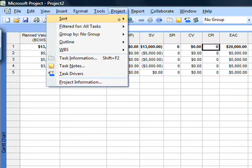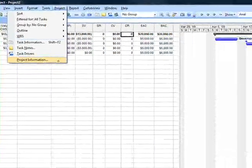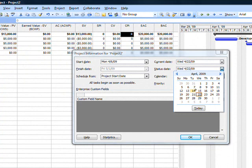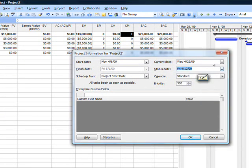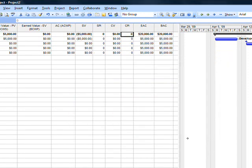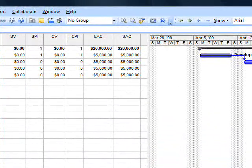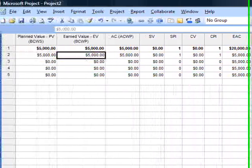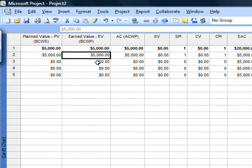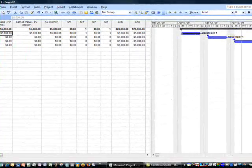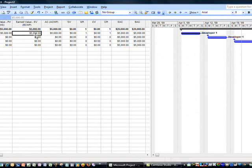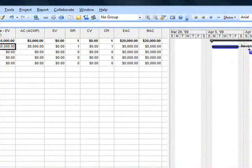Now let's observe the effect of status date. Go to Project > Information and set the status date. Let's say we've worked for an entire week — the project started on the 6th, this is Friday, and this is an inclusive date, so this would be at the end of Friday. If I've done no work, there's no earned value. But let's pretend I've done all 40 hours that week. The earned value data is $5,000. The associated cost is the same. There's no schedule variance — the planned value was $5,000 for that week and I earned all of it. It's difficult — in fact, impossible — to determine what the status date is just by looking at these numbers.